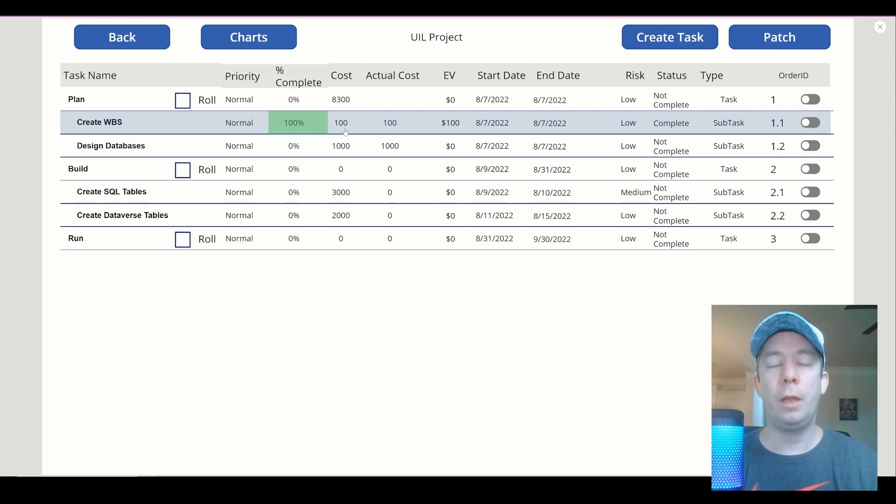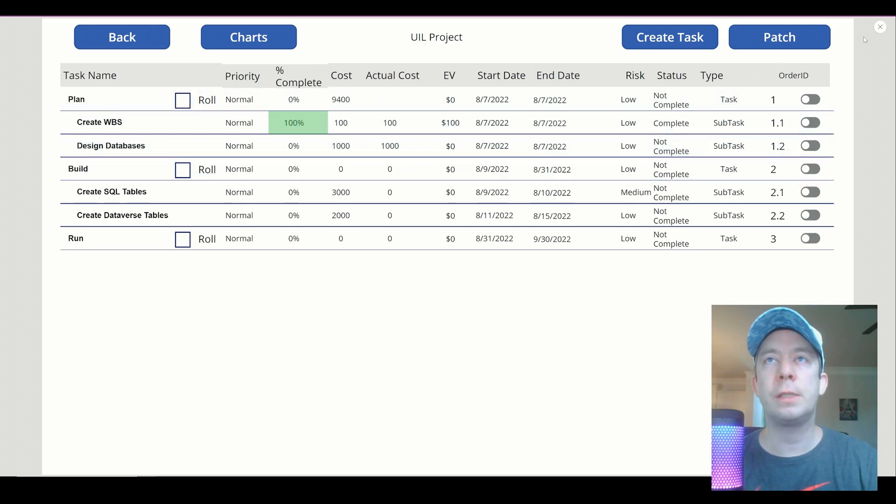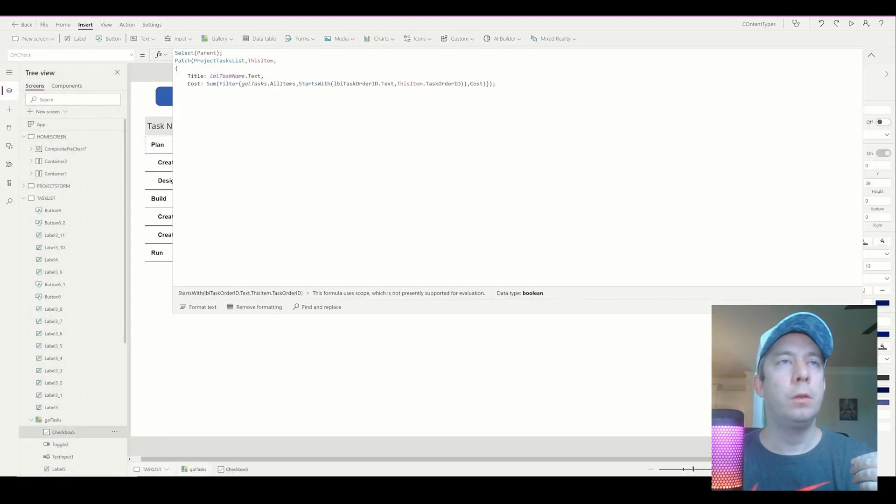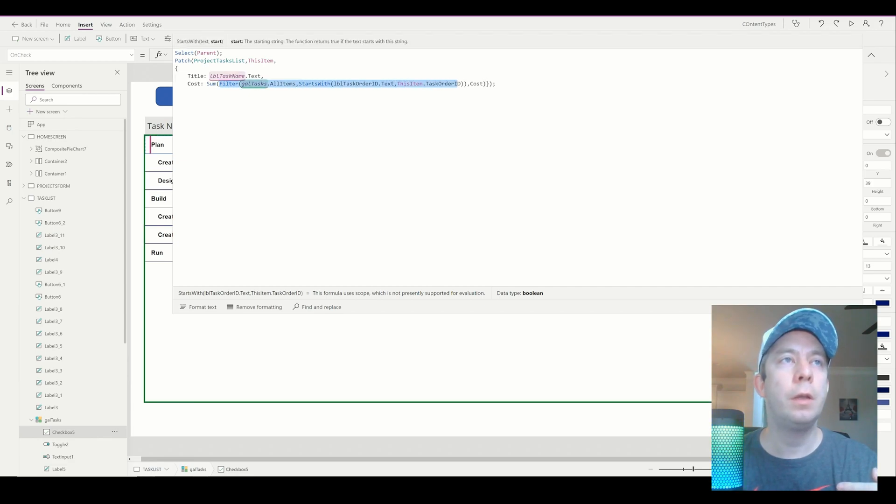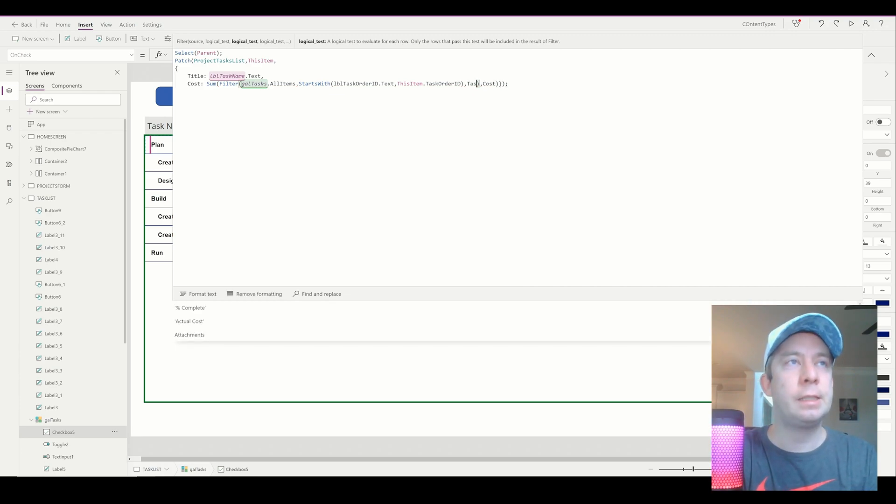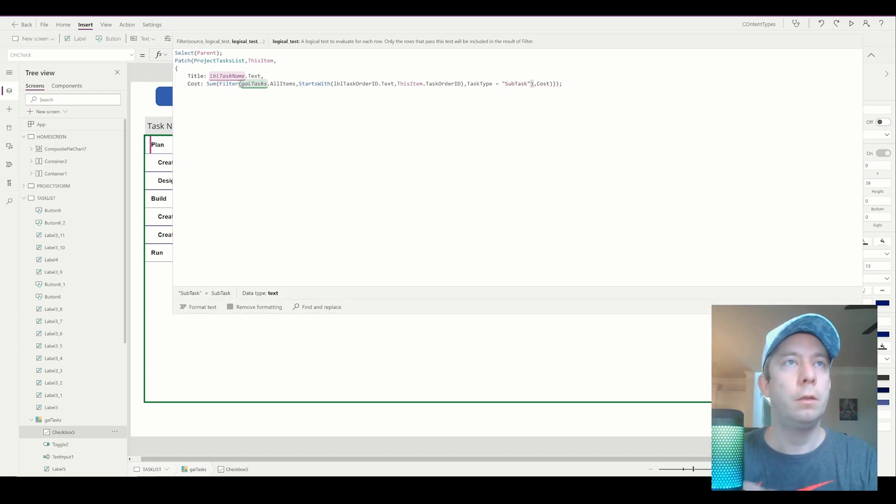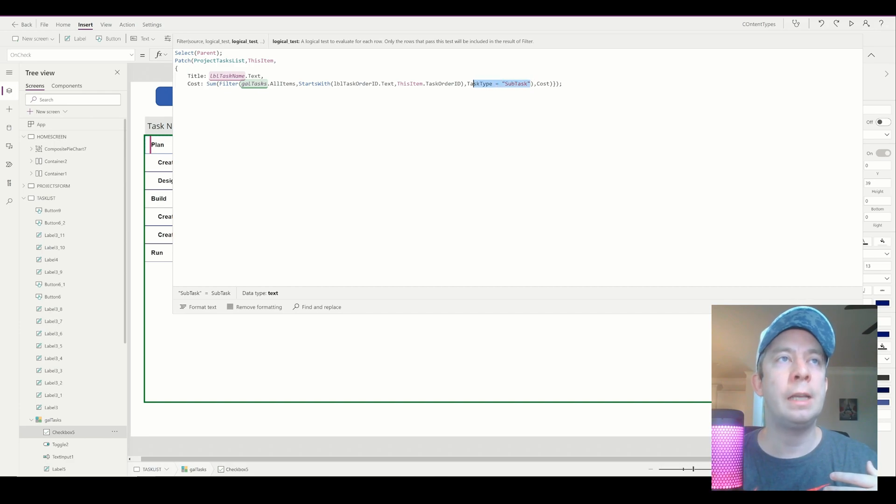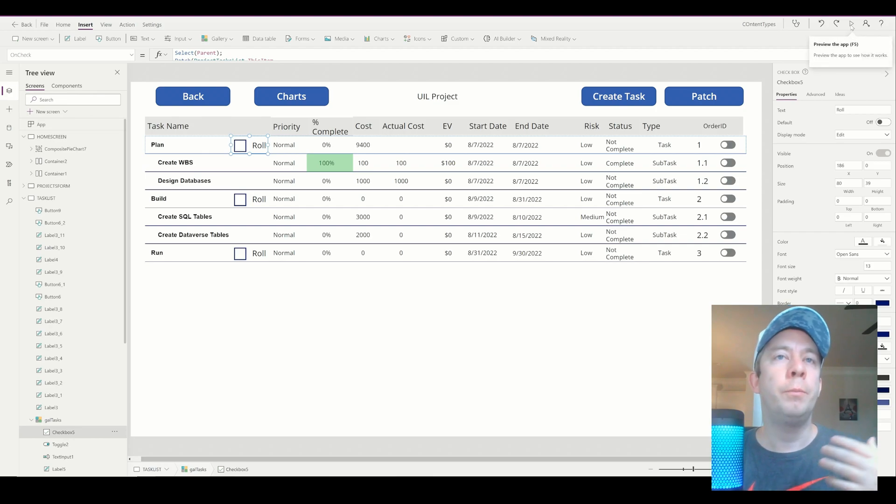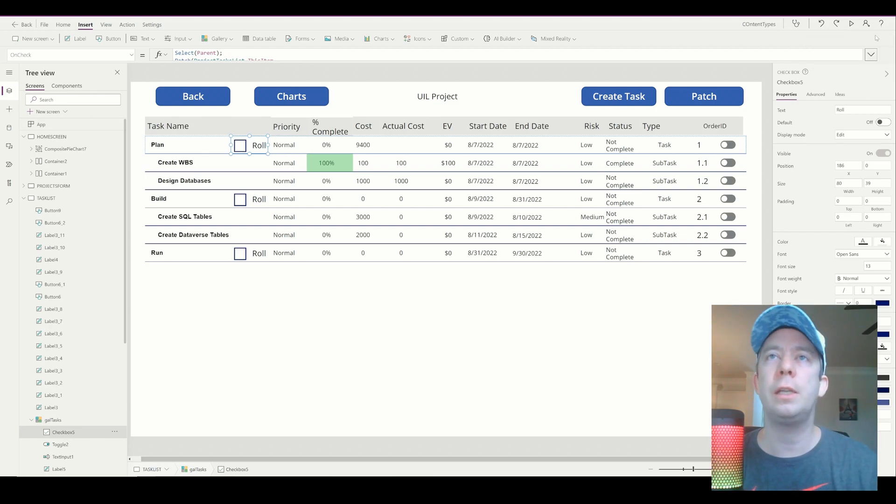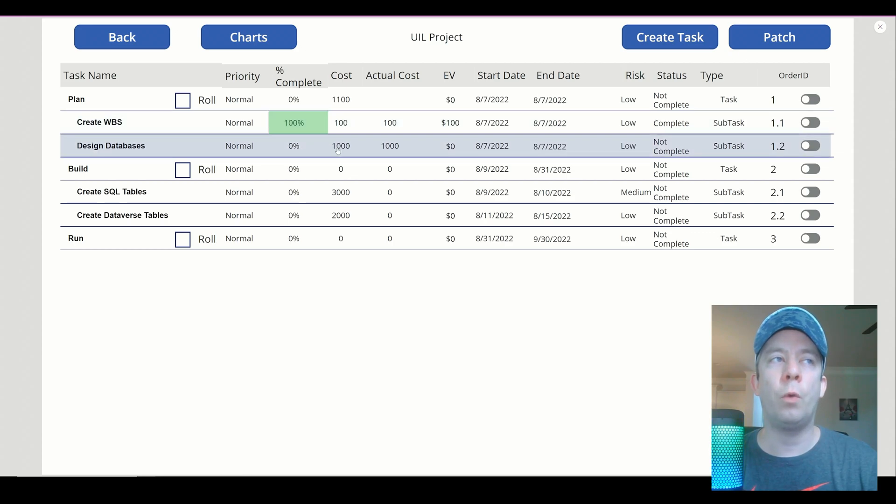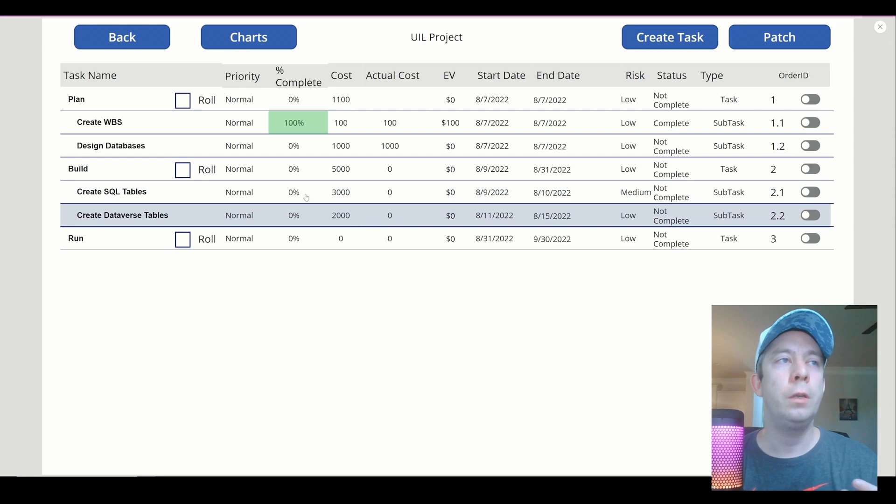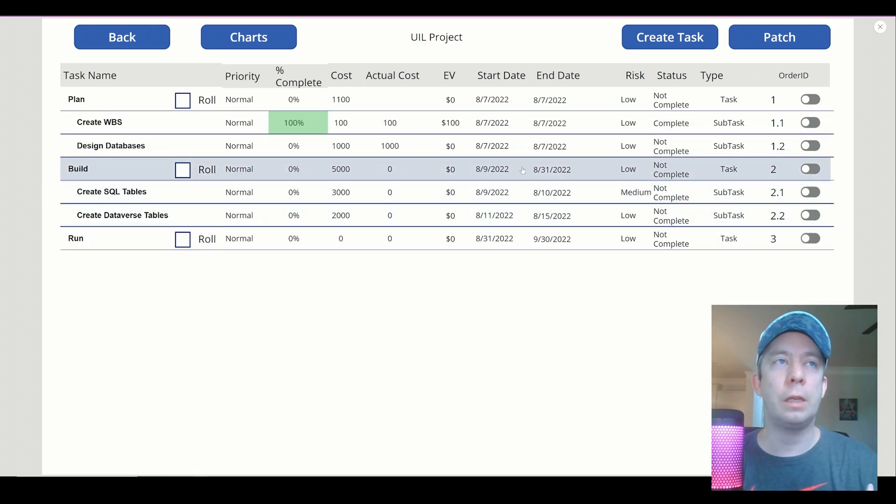Now, in my case, my scenario, I have a column here called subtask. Let's only sum it when it's equal to subtask. So let's go back to our filter statement here. We're only going to filter it, and I believe the comma goes right here, when task type equals subtask. So that's when we're going to filter it. We're going to filter it when task type equals subtask. So I know this is complex, but technically this is just figuring out how your data looks and doing some math behind it. So now when I hit the roll, it's going to write 1,100 and it rolls up 5,000. And then obviously this one has zero, it's going to remain zero. So we have cost now rolling up.